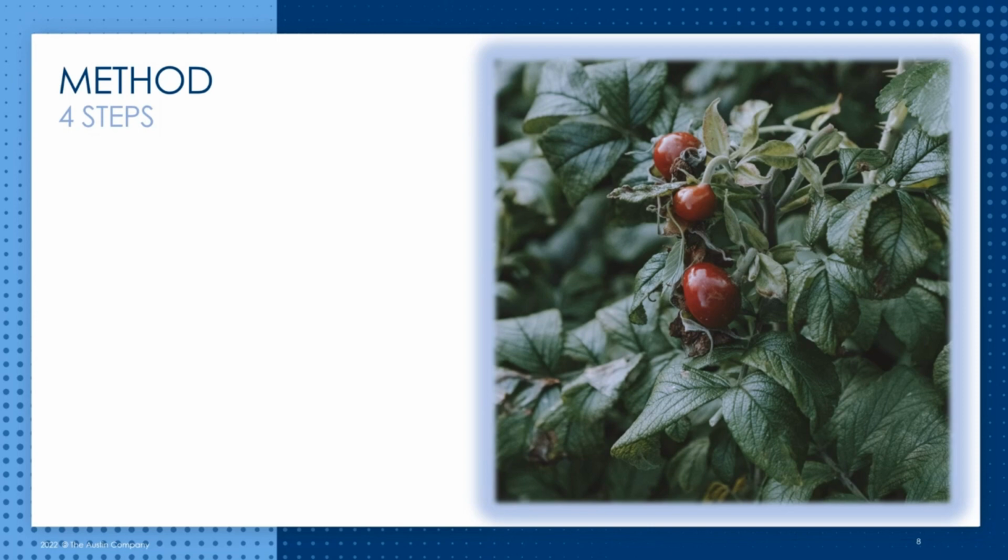So what exactly are the steps of the BIM Metrics method? The process is technical and computer-based. However, it can be distilled into 4 primary steps. First, the design-build team must identify what needs to be quantified. Second, the BIM model itself must be properly organized as the model is generated and developed.